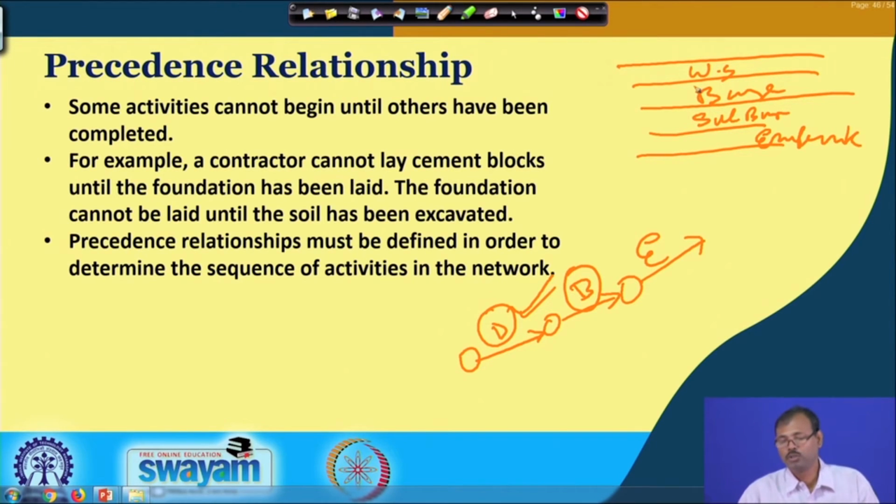Okay. So, the embankment, which is the soil or subgrade, has to be placed first, and that must be rolled properly. Then only the sub base, which is basically the granular sub base, those aggregates, can be placed on this soil layer.